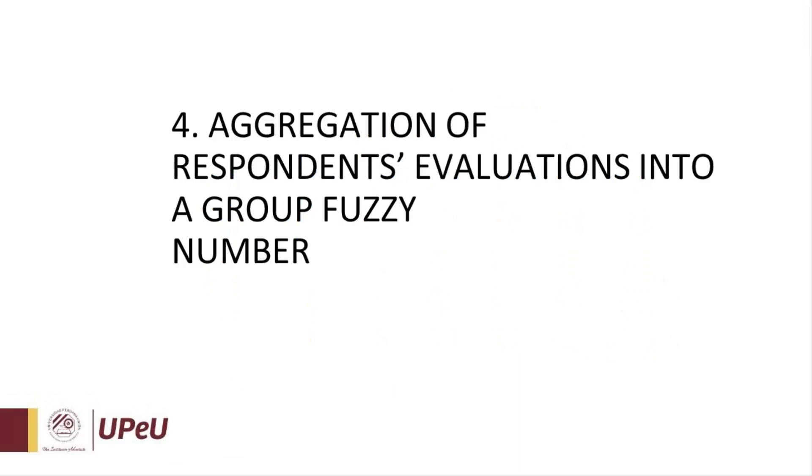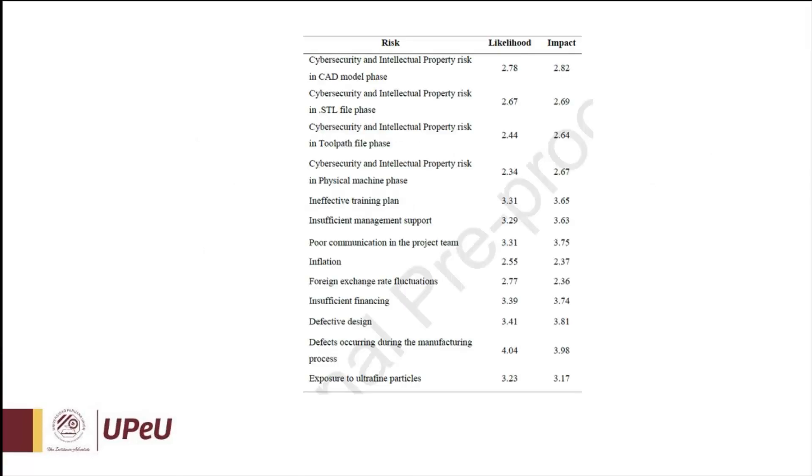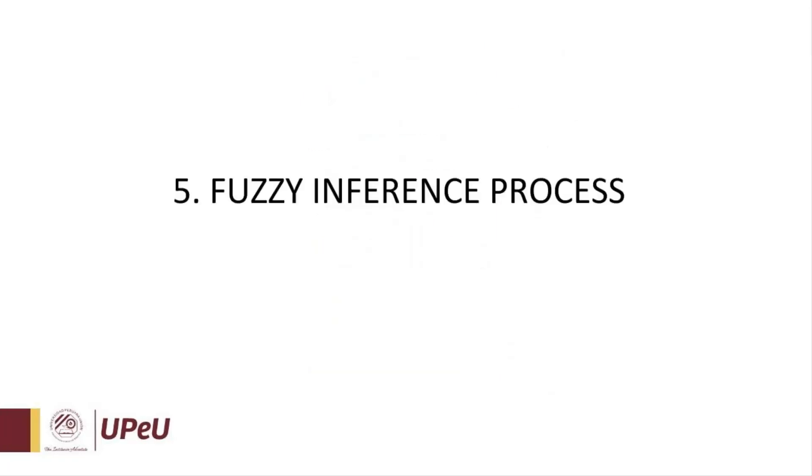Step number four: Aggregation of respondents' evaluations into a group fuzzy number. In this table, we can see all of those risks identified by academics and professionals with noteworthy expertise in this sector, in 3D printing and project management. We will insert all of these values for likelihood and impact into our fuzzy inference process.